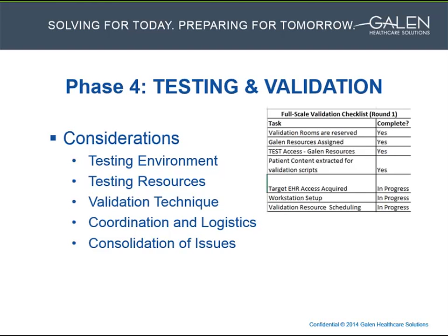Usually the core project team will review the issues list, assign out tasks, and retest the issues once they have been resolved. This process, however, should be worked out ahead of time with the client, with special attention to how and who will be doing the retesting and sign-off of the issues.